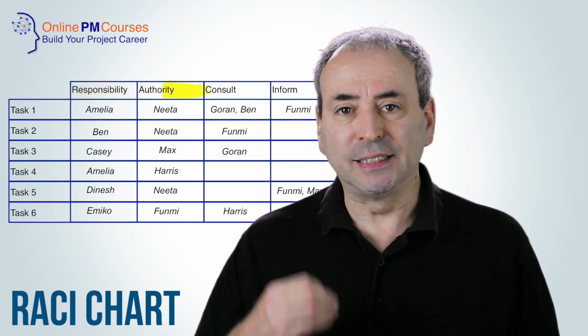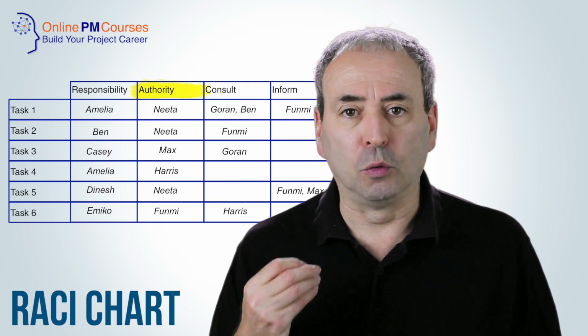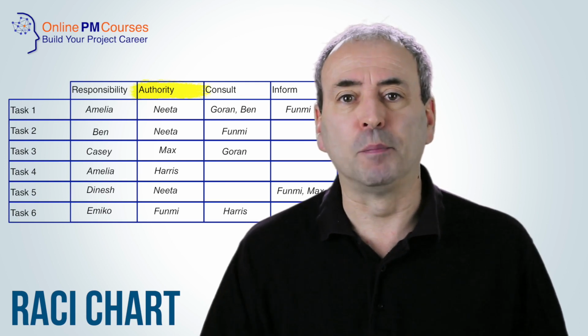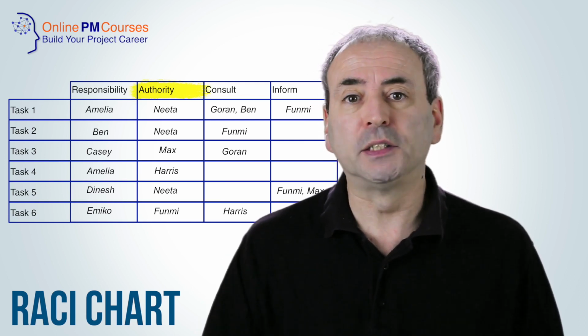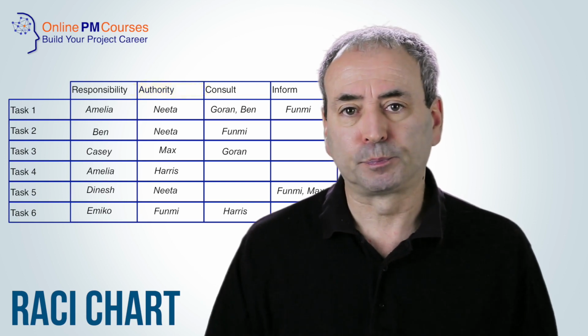Then there is the authority, sometimes labelled as accountable, but I prefer the word authority, to sign off the task as properly complete. This may be a quality review role, or it may be a leadership role.